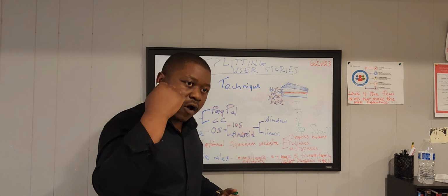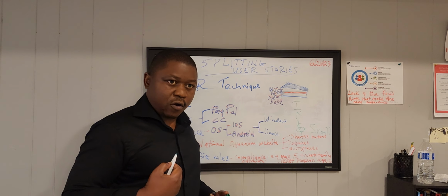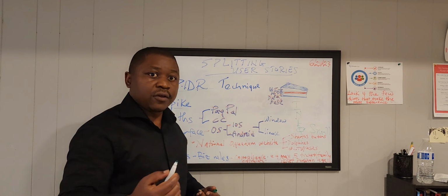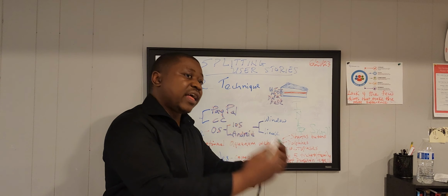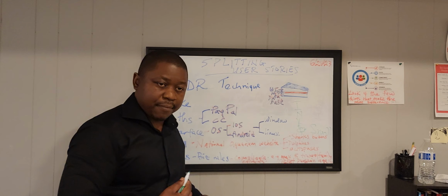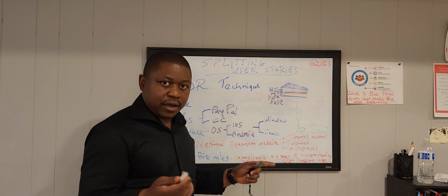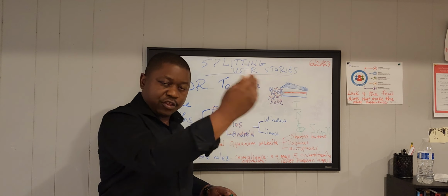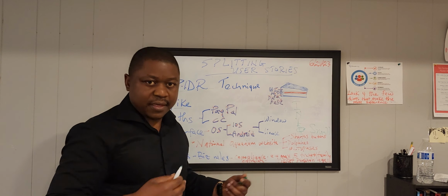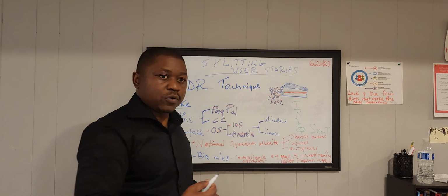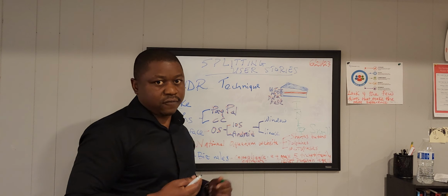Then it now becomes very important to take that back into the product backlog and maybe create a research story or an investigation story to carry out further research so they can make sense out of that particular business requirement or user story. So that's how you create a spike. And if you are using Jira in your environment, there's always an issue type known as spike. So you create a user story and you give it an issue type spike, such that research would now be done on that particular user story. What design route do we want to take on that particular user story, for example?